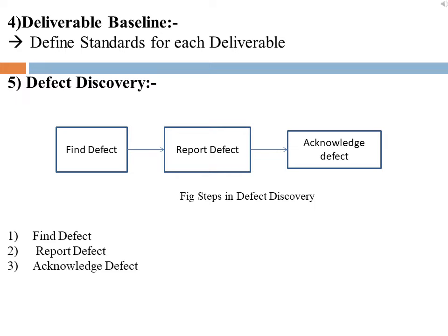level of formality that is appropriate, and the point in the process when the formality takes effect. In general, a deliverable should be baselined when changes to the deliverable or defects in the deliverable can have an impact on other people who are working on it. In this, the first step is to define the key deliverables involved. These are the deliverables that will be baselined, and the point within the development process where they will be baselined.